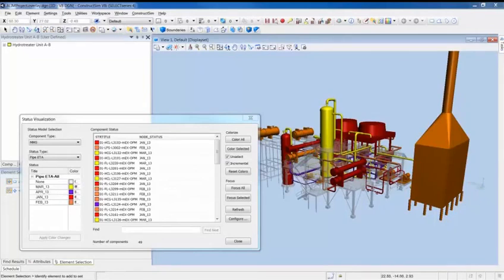If the heat exchangers are being supplied by the same company and the 4th is in stock and ready to be shipped with the others, it would make more sense to ship them all together and therefore save on shipping costs. This will also ensure that we remove the risk of the 4th being delayed later. And as we can see on the model, this is especially important as it is actually being installed first.